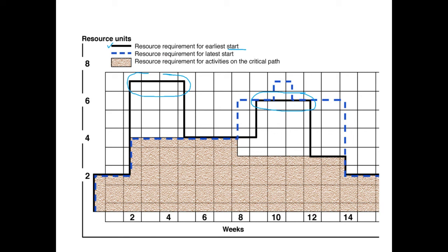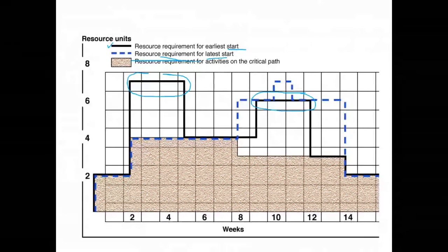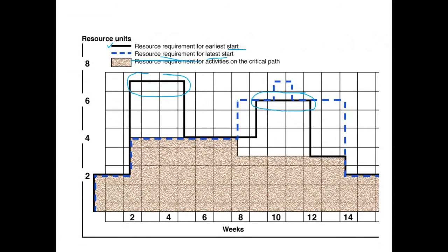That's one way to plan your resources, and the other extreme is that you plan all of your activities on a late start date, which is shown by a blue dotted line. If you do that, your project is very sensitive because you're eating up all the float to start with. However, you can see the resource histogram resulting from the late start is slightly more leveled than the first one. Here you can see for the initial weeks it has remained consistent, and then from week 9 to 12, even though there is a peak, it's a consistent peak for quite a few weeks.